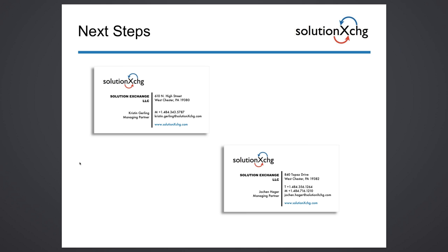Actually, that's what we do usually in the early project phases anyway, to determine the speed of the migration process, to determine your network speed, the speed of the legacy archiving server, and be more than happy to do this under the right circumstances with proper non-disclosure documents in place, and prove to you how effective the process can be.